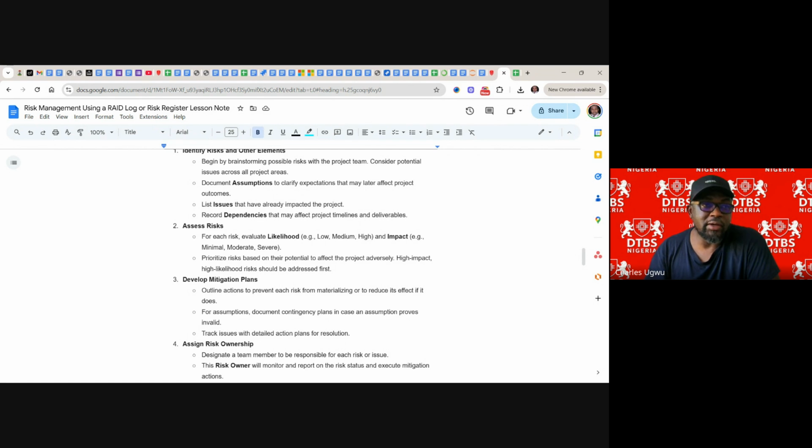We can say, okay, we're going to keep £4,000 as contingency, or that is extremely tight. We'll say £3,000 as contingency, and we'll start planning our projects with £7,000. So if eventually anything happens, we can fall back on that and use another 1,000.